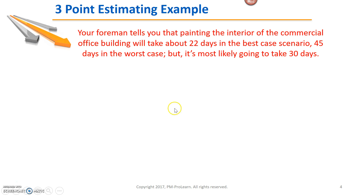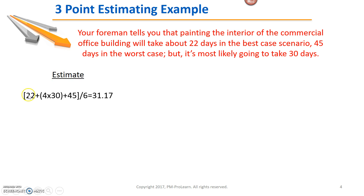Let's look at an example. Let's say I'm building a commercial office building, and my foreman tells me painting the interior will take about 22 days in the best case scenario, 45 days in the worst case, but most likely 30 days. So let's plug those numbers in: optimistic of 22 plus four times the realistic of 30, plus 45 for the pessimistic, divided by six. My three-point weighted average is 31.17 days.